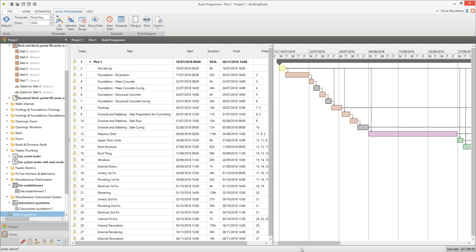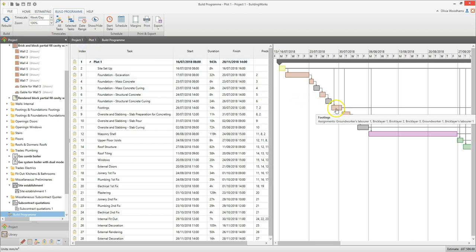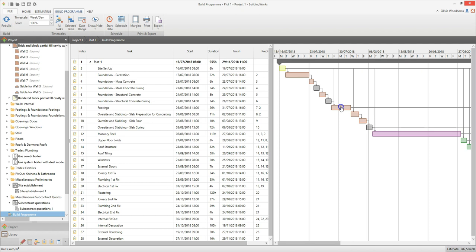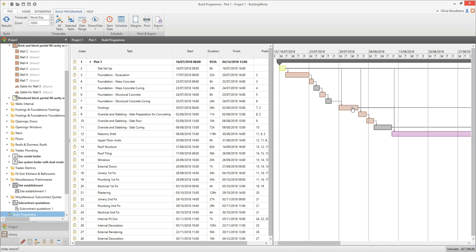When changing the start date or duration of tasks it helps to set the timescale to week/day, and also check that you are zoomed in to 100% so you can clearly see the days and weeks on the chart. If you hover your mouse over a task you will see the task name and the labourers assigned to it. To increase the length of a task, hover your mouse over the end of the bar until a double headed arrow appears, then hold down the left mouse button and stretch the task to the desired date. To move a whole task, hold down the left mouse button in the middle of the bar and drag it into its new position. Any changes will automatically cascade through the later tasks. Take a look at the video on setting up the build program for advice on how to get the most out of your build program.